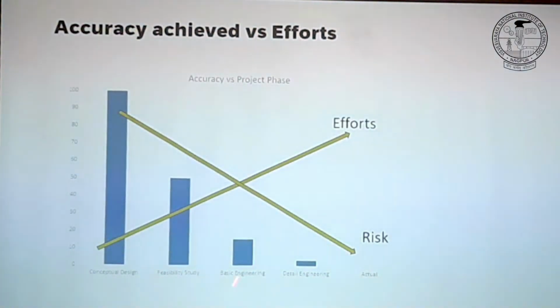And with each and every step, you go out and understand, now I need to connect A and B, and the D component, it will cost this. So what you are doing is defining it more and more, and with this, the uncertainty that you will have a surprise, that I assumed 20,000 but it costs 40,000, the probability of this surprise you are reducing slowly, which in turn means reducing financial risk.